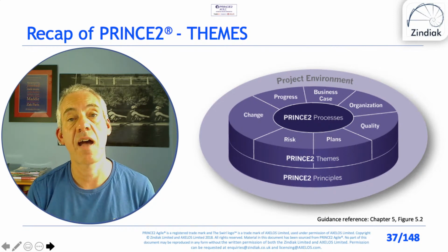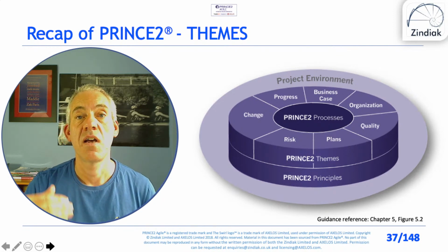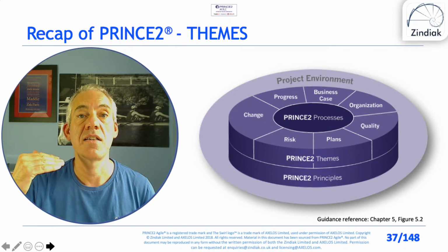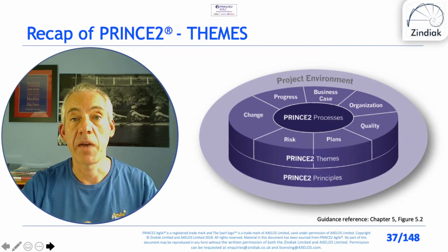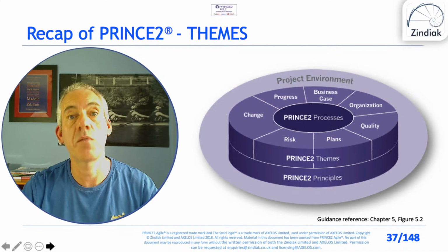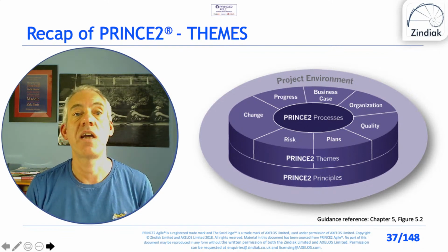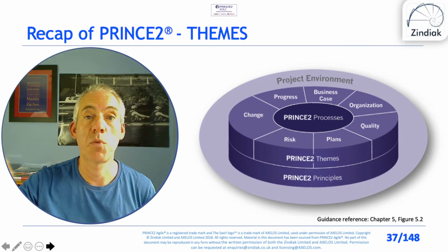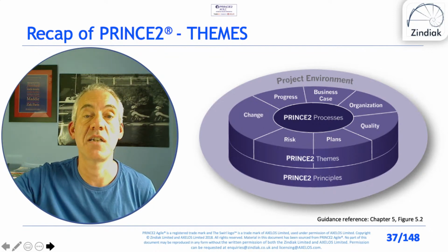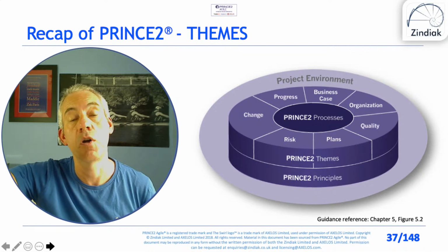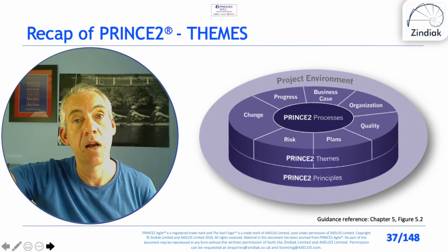As I said, in the exam, there will definitely be questions asking you to understand the difference between detailed change at the lower level that can be handled by the development team because you've delegated that authority to them, and baseline change, which could affect the business case, which they need to either escalate to you as project manager, or you as project manager need to escalate to the project board, or maybe even the project board need to escalate to corporate, customer, or program management if you're part of a program.